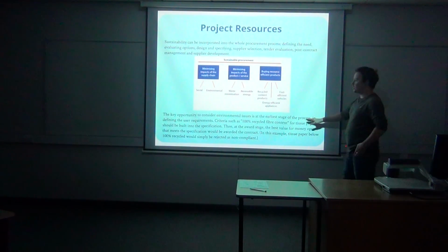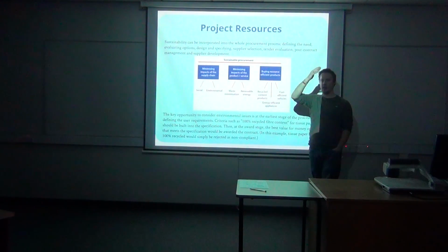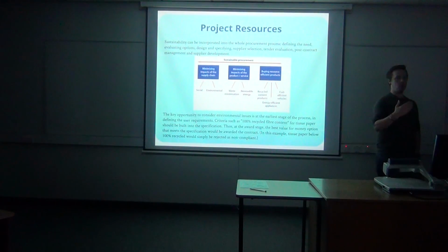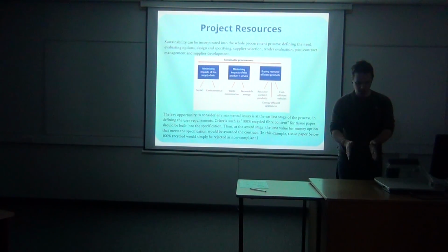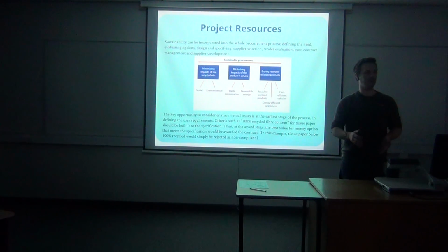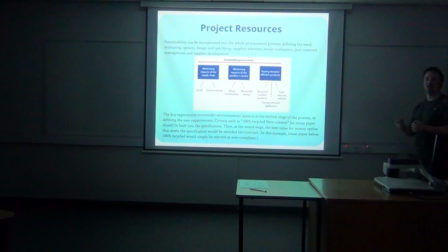So what this is basically saying is, if you've got in your early stage that we're only going to use 100% recycled material in our procurement options, when you come to look at your procurement, you won't just go for the cheapest option, because you'll say, well, that's the cheapest one, but it doesn't meet our requirements, it doesn't have 100% recycled. So you'll only go with the particular one that you set out. So you're setting your intentions out for resources at the very early stage.